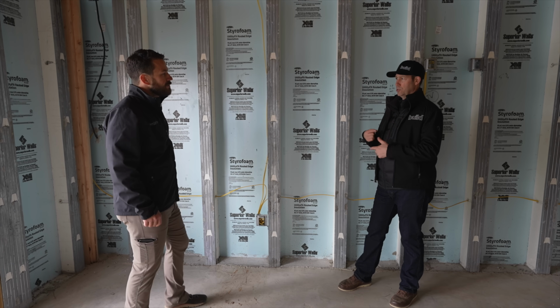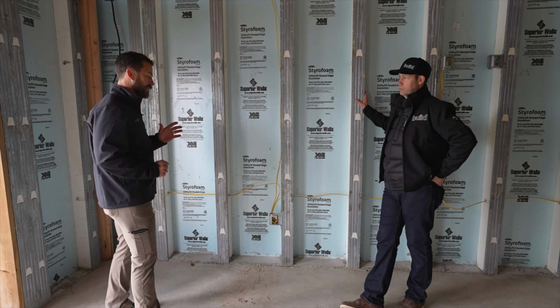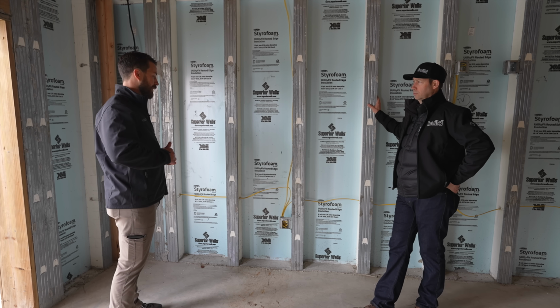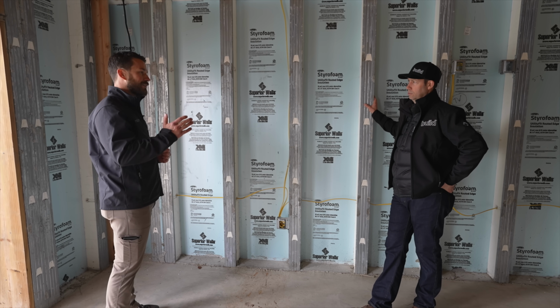Talk to me about schedule. Does this help you at all on schedule? Yeah, that's the neat part about this. If you have your plans ahead of time and you send it to them for a quote, once you approve it, they send it off to engineering. They actually stamp it with their structural team. At that point, once you sign off, they get you in the production line.